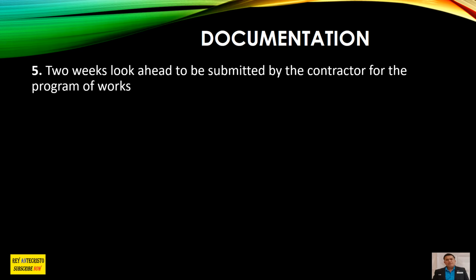So during the meetings with the contractor, we can discuss why it has been delayed, what the issue is, any materials issue, or any manpower issue. That is related to the meeting, why we are not capturing, why we are delayed as per our look ahead. Okay, so that's the purpose of the look ahead to be submitted from the contractor to the client.